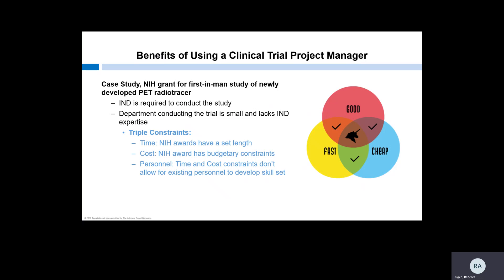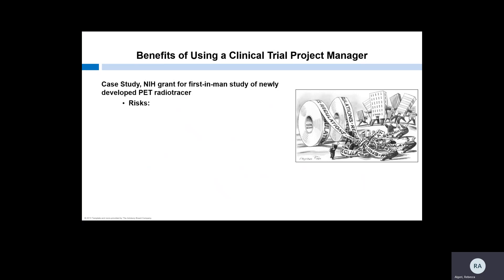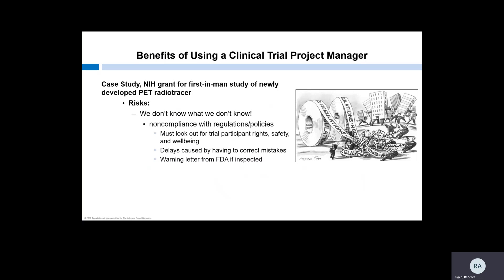The time and cost constraints are going to prevent the study team from being able to invest both the time, and therefore money, into learning how to manage an IND and sponsor responsibilities. What are the risks if the team moves forward in their current state? They don't know what they don't know, which is highly likely to lead to non-compliance with federal regulations as well as internal policies and procedures. We have to do the right thing by our trial participants — their rights, safety, and well-being need to remain top of mind. Messing up and having to redo things is going to take more time, which we don't have because the grant has both start and stop dates. Plus, if we get selected for an FDA inspection and we don't know what we need to do, we'll miss requirements and get a warning letter. This cartoon is about banking regulations, but I think it hits the mark on how investigators and their teams feel about IND regulations as well — it's a tangled knot that's difficult to unravel.